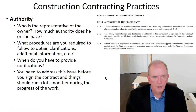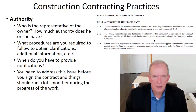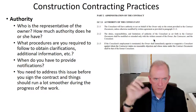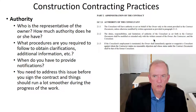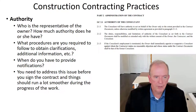Authority: if the owner or client gives authority to someone to represent them, that's usually the consultant. The CCDC contract includes a section on the authority of the consultant, giving them authority to look after the owner's interests during the construction process. They do things like inspections and reviewing payments — a lot of things the owner is quite frankly not skilled to do. They're hired for that purpose to allow things to run much more smoothly.